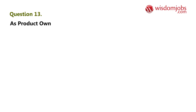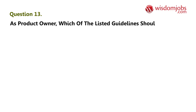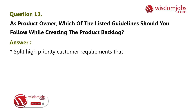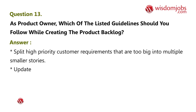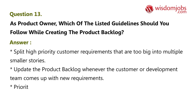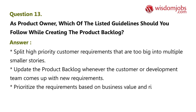Question 13: As product owner, which guidelines should you follow while creating the product backlog? Answer: Split high-priority customer requirements that are too big into multiple smaller stories; update the product backlog whenever the customer or development team comes up with new requirements; and prioritize the requirements based on business value and risk.